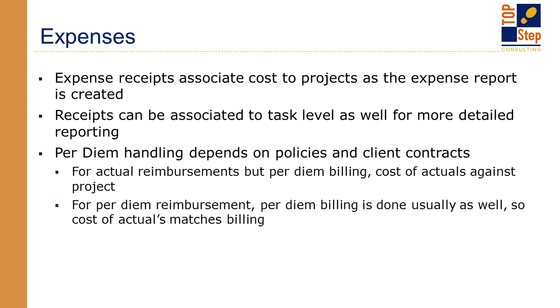Many organizations bill and/or pay on a per diem basis. So if they are actually paying out actual reimbursements but billing per diem to the client, the actual reimbursement is what hits the projects. So you may be losing revenue if you are doing per diem billed back to the customer. If you're paying per diem reimbursement and you're billing per diem to the customer, then the costs are going to match.